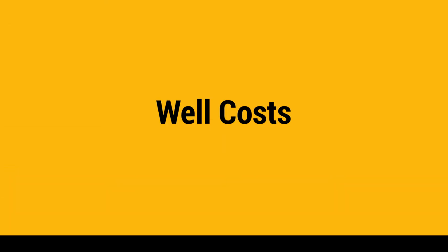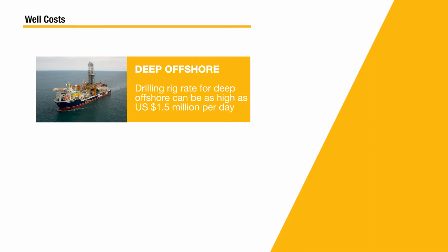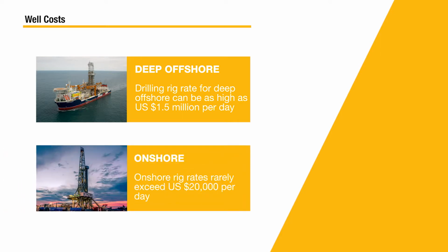The additional challenges presented by offshore oil and gas operations translate into significantly higher cost when compared with onshore or nearshore operations. The cost of drilling wells varies by water and well depth. The drilling rig rate for deep offshore can be as high as $1.5 million per day when demand is high, while onshore rig rates rarely exceed $20,000 per day.